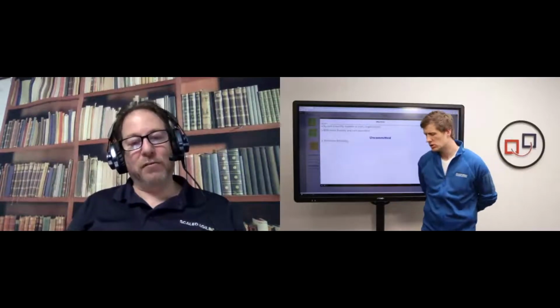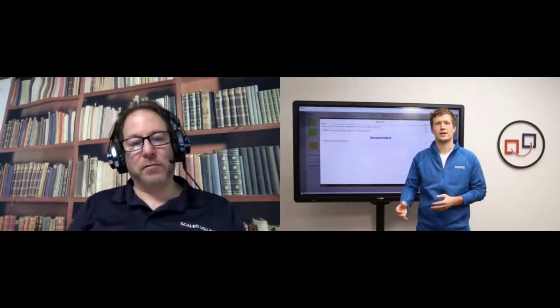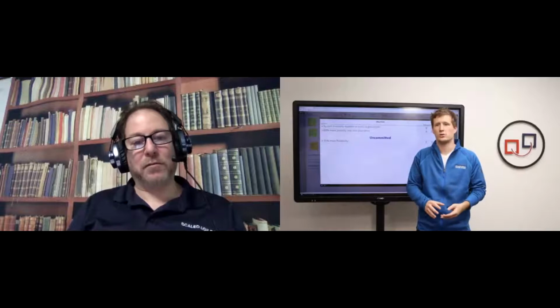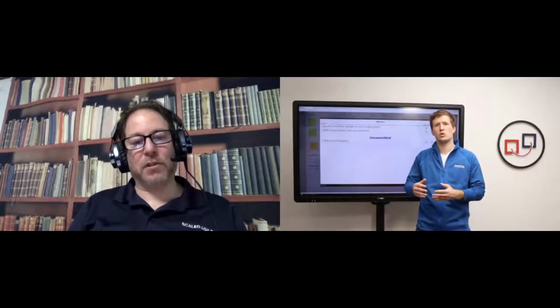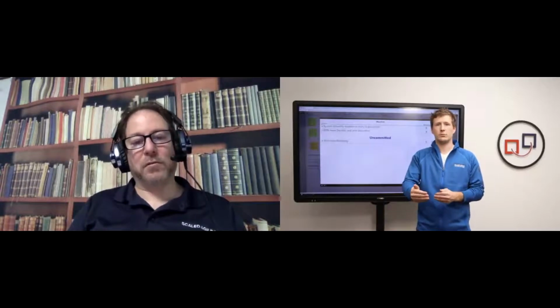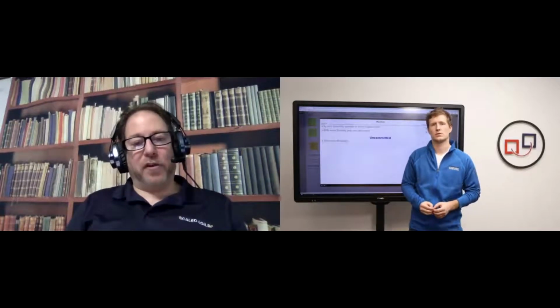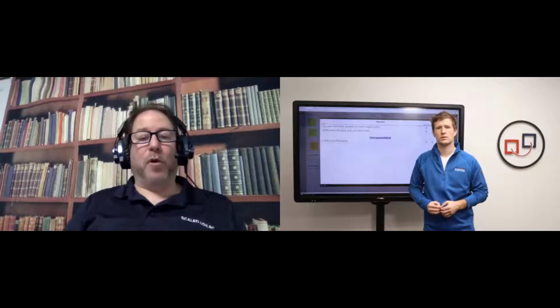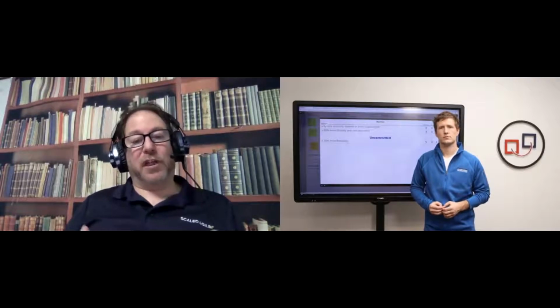What would you recommend? Because I think the duration of those presentations, let's say on the first morning, doing the business context and the product vision, is too long in a remote setup. So you need to make those presentations shorter, allowing the teams to have more time during the team breakout session. Yeah, that's certainly a good point, and I think there are two ways you can do it. We chose to do it over 3 days so that we could have the business context, and it all depends on that particular PI.